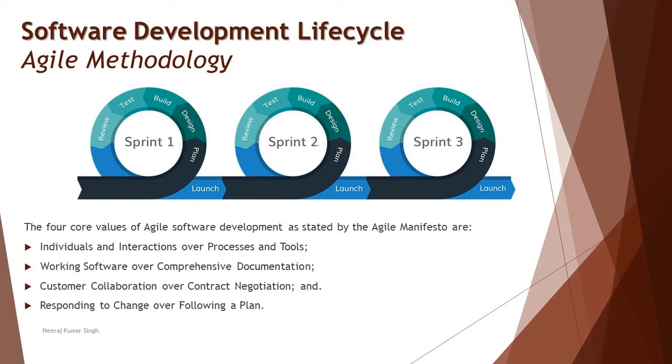Most important thing to understand in Agile is, unlike the sequential development models, Agile is an iterative model or incremental model. So it's iterative, incremental. Now, what is iterative? That means the work is done several times within a particular release. For example, all the circular pictorial representations here represent a particular sprint. Now, what is a sprint? It's an iteration of several sets of activities. For example, you plan the work, you design the work, you build the piece of code, you test it, you review it. Similarly, you continue doing this in the next sprint and the next sprint and the next sprint and so on.